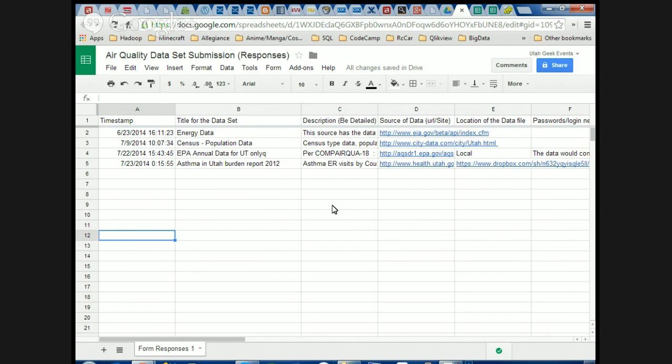Second, what are the resources available? What is the timeline? How soon do we need to get there? So we start from point B. Once we have a clear definition of what point B is going to look like and what good looks like there, we start working back and identify the major milestones that will take us from where we are today, point A, to that point B. That has got to be a team effort. It can't be dictated from somebody or some higher up. The milestones have got to be created by the team. That is very important, because if in the creation of milestones the team cannot figure out those milestones, that's going to be a big stumbling block later on.